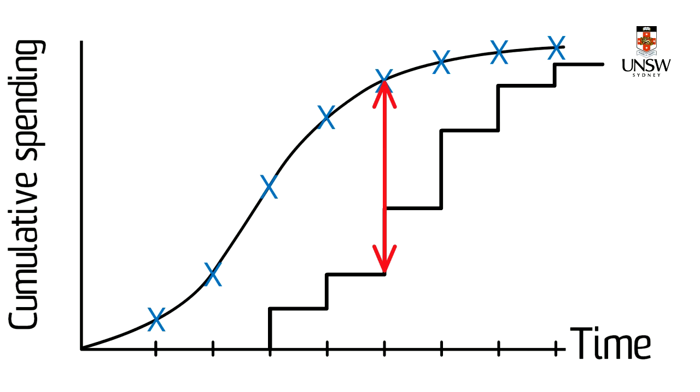The point is, the construction company needs to have that much money. So they have two issues. The first issue is, where does the money come from? At some stage, the contractor requires enough money to cover the largest gap between the two lines. You need head office to have the money, or to have a line of credit with a bank to get the money. Secondly, the project will have to pay interest on the money.